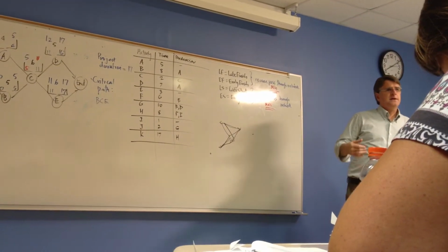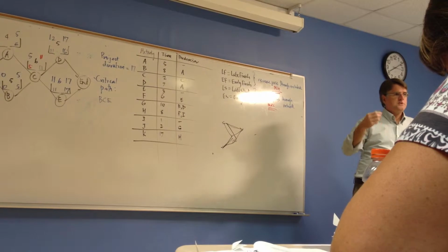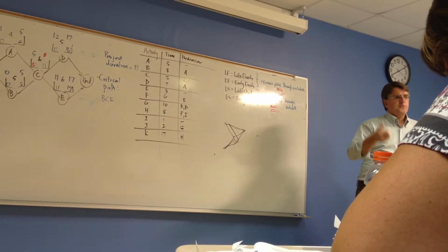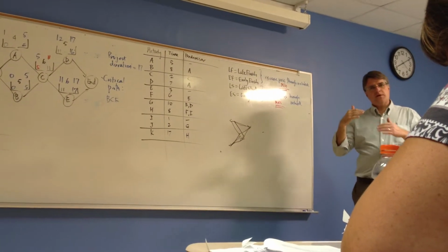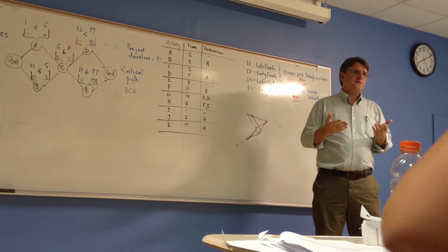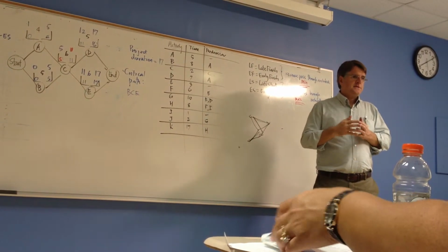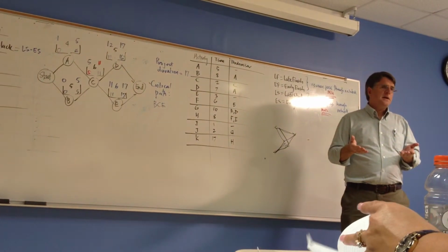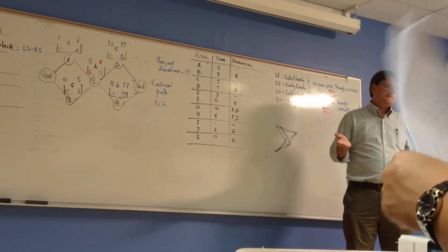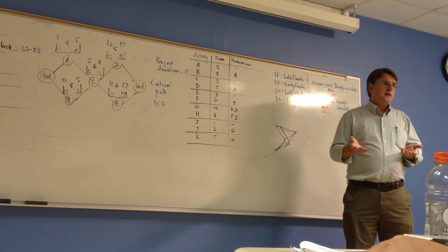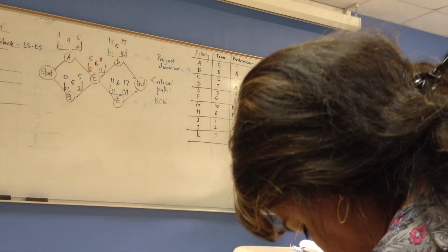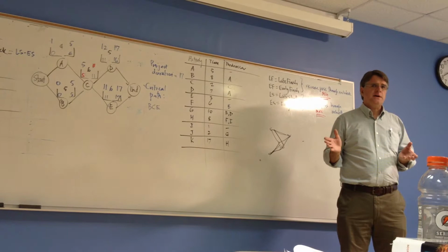Now, just about any contractor is going to be prepared to do the job in less time for a markup. Of course, there are some technical limits as to how far a job can go. Like if I was contracting to tile your house, let's say you've got a 4,000 square foot house, I could probably do 4,000 square feet in 6 days, normal. The absolute minimum would be something like 2 days.